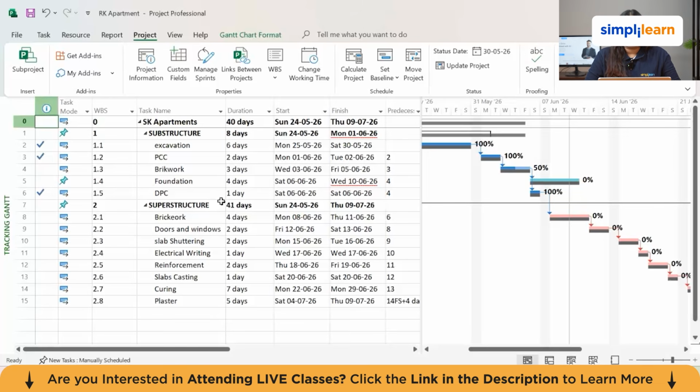After seeing this, you realize that setting the baseline is the moment your schedule transitions from a planning document to a control tool. Without a baseline, you have no reference point. You cannot tell whether a task finishing on 15th March is on time or 2 days late, because you do not have an approved plan to compare it against.